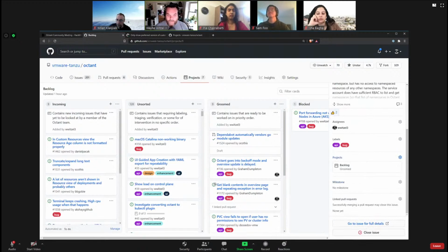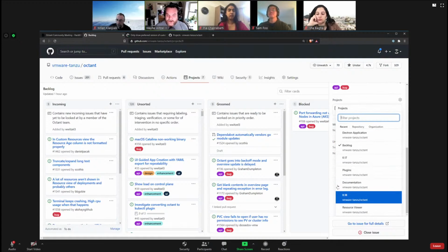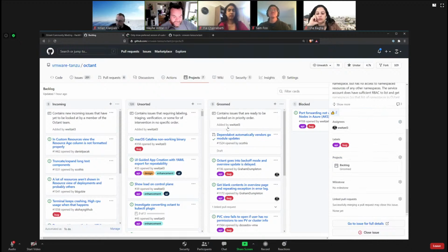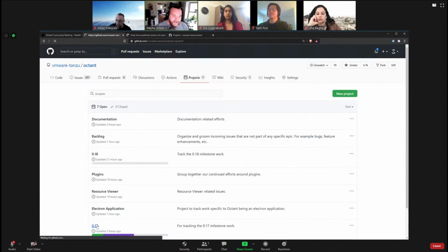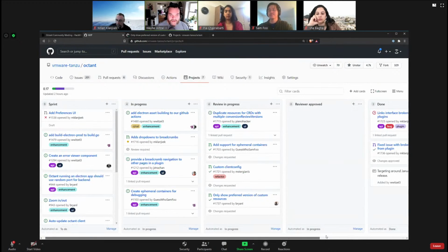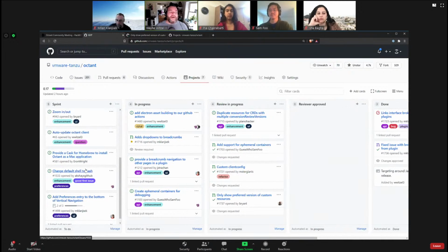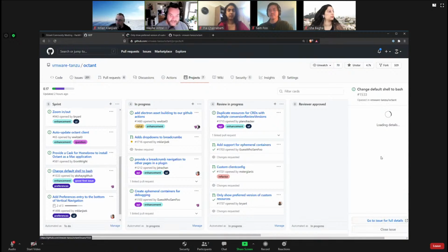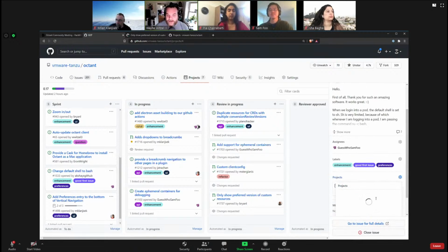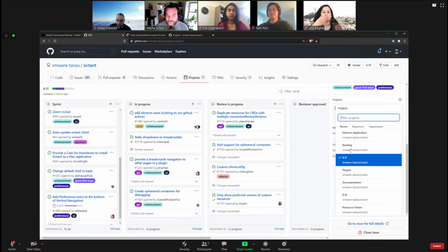Like if we were going to work on this for ODOT 18, I would add it to ODOT 18 and remove it from the backlog of stories here. And same when a project is completed. If we are looking at ODOT 17 and we get through all of these and there's 2 left in here and we're not going to do them and they're not going to go to ODOT 18, then I would just kick them back into the backlog.